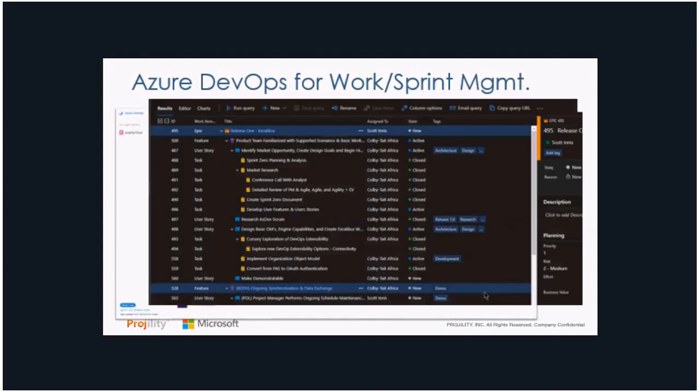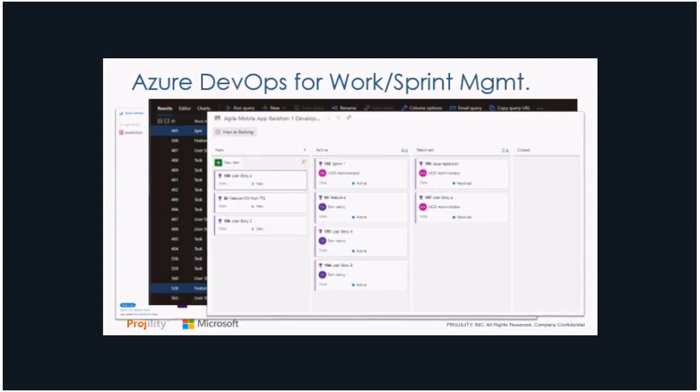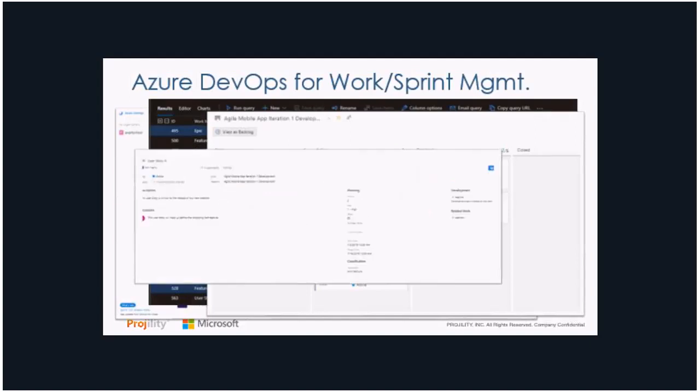And there are some inherent challenges in that, because if I go in as a developer and I look at the different activities I have, I've got active activities, I've got resolved activities, I've got sprints. And then if I click in on any of the user stories I'm supposed to be updating, you'll see I can put notes and details here, but essentially I'm going to be updating work. So there's 40 hours, I've done 20 and there's 20 more to go, but I'm not saying exactly when I'm doing that. I'm actually logging that at a certain point in time, and it's not saying I did 8 hours today or 4 hours yesterday or 2 hours the day before. So that concept of time-phased work isn't really a part of Azure DevOps or any development operations suite. It's something that their tools aren't really designed to do. They're supposed to be very flexible and very agile in nature.